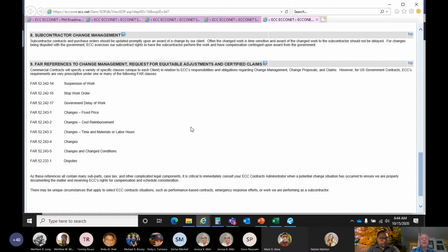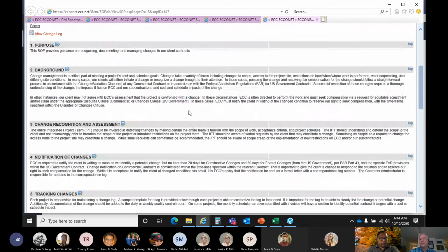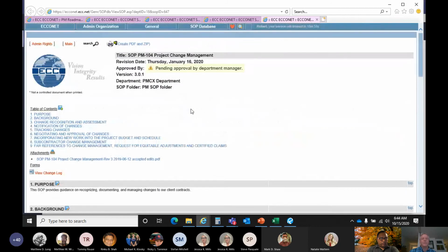Most importantly being notification times and notification methods, because we don't want to lose out on our opportunity to recover something that's a change because the requirement was to respond in 7 days and we responded in 10.